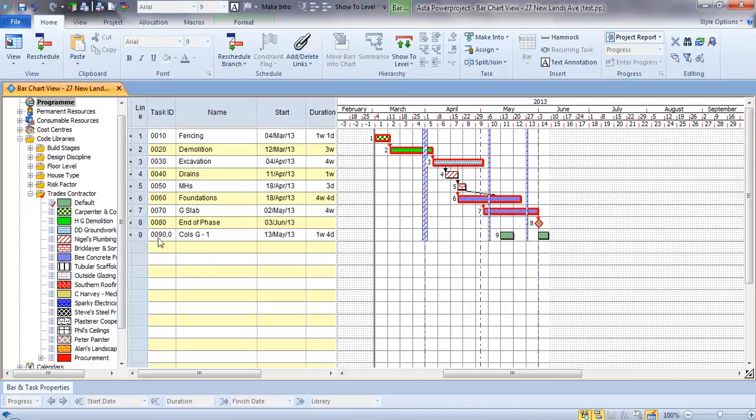They are different activities in their own right. They can have a different activity code, they can have a different resource and cost, they can have a different logical arrangement. They're not pseudo tasks in the same way they are in Microsoft Project, and the ability to do this helps us condense a lot of information at one time.